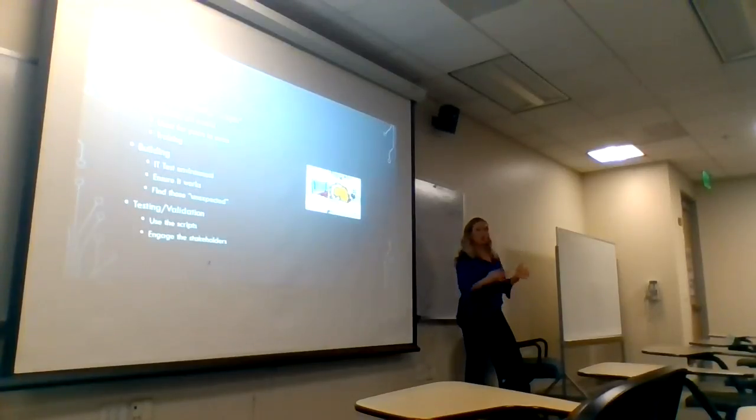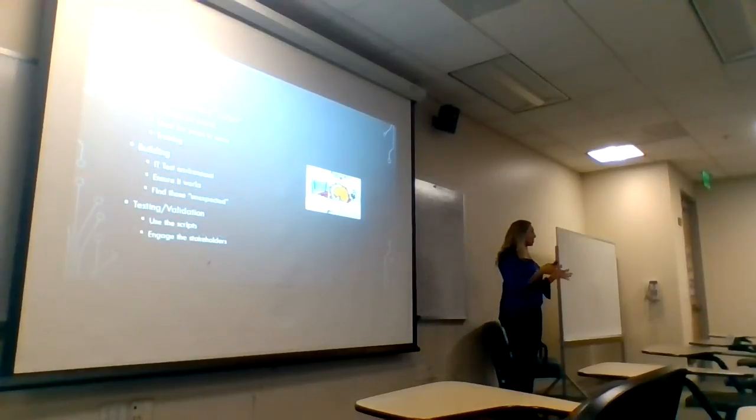We've been using and modifying the same testing scripts from our EHR that we started with when we went live, oh my gosh, almost 7 years ago? Yeah, almost 7 years ago. We have test scripts that we created and we've added to them because as we do an upgrade, you have to retest to make sure basic functionality didn't get modified or removed. It also can be used for training. So those scripts help to format the training of, hey, how do you use this? What do we need to look at?